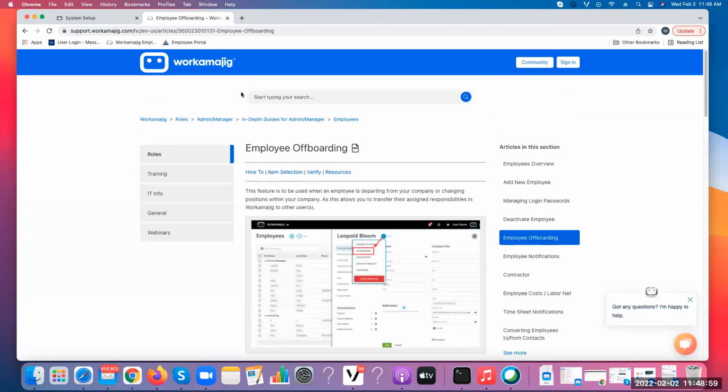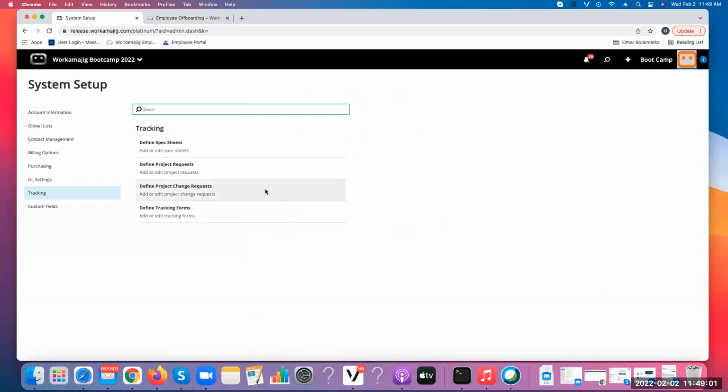The answer is absolutely. We have a workflow for that. And it's in the employee record. So if you don't have access to the employee records, that might be workflow wise internally at your agency that you have to contact the admin and say, oh, so-and-so has left, please remove them from all the projects and replace them with Marlene. Or if you can't replace them with a person yet, because there is no person to replace them with, you can just say, return it to the service it was assigned to. And if you're using your staff schedule, you'd see it as, oh, this needs to be assigned out to somebody on the staff schedule. That's why I say we really don't have time to go over it, only because it can get more complicated, but in a good way, in a way that'll meet all your needs. We just need to kind of talk to you about what your workflows are for that too.